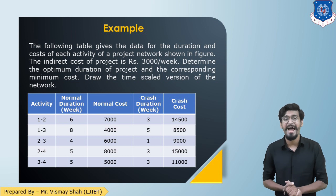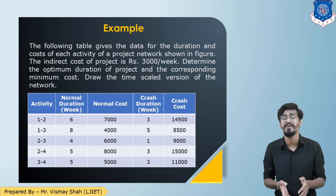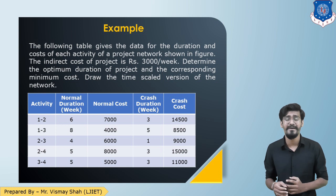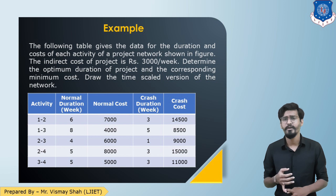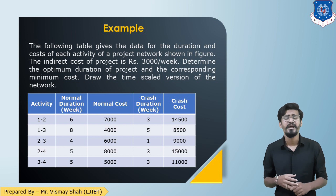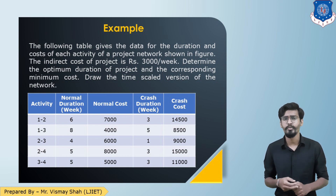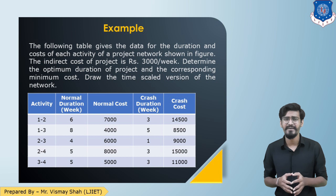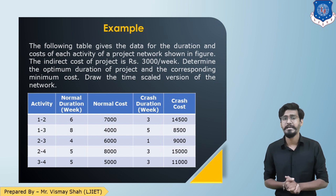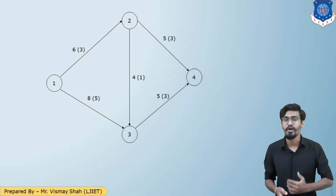We need to find the optimum duration and minimum cost associated with the project. The table has columns: activity, normal duration, normal cost, crash duration, and crash cost. Activities are given as event pairs: 1-2, 1-3, 2-3, 2-4, and 3-4. The normal durations are 6, 8, 4, 5, and 5 weeks respectively, with corresponding normal cost, crash duration, and crash cost data given.